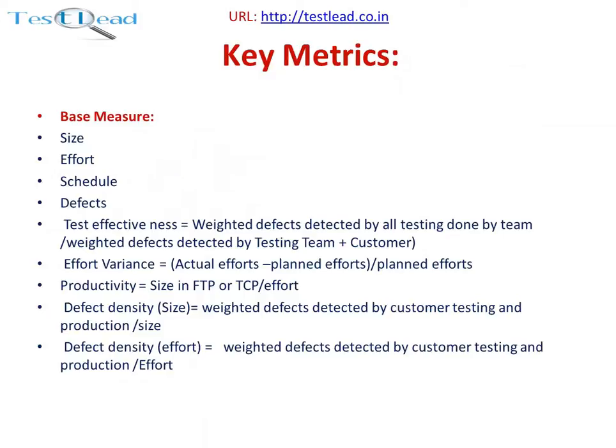Effort variance equals actual efforts minus planned efforts, divided by planned efforts. For example, when testing starts, the effort calculated before testing begins is the planned effort. The actual effort is the effort taken by the team to test the product or application. The effort variance is then calculated as actual efforts minus planned efforts, divided by planned efforts.